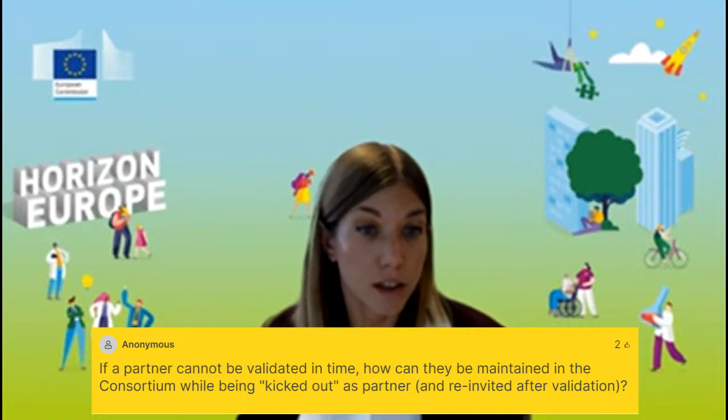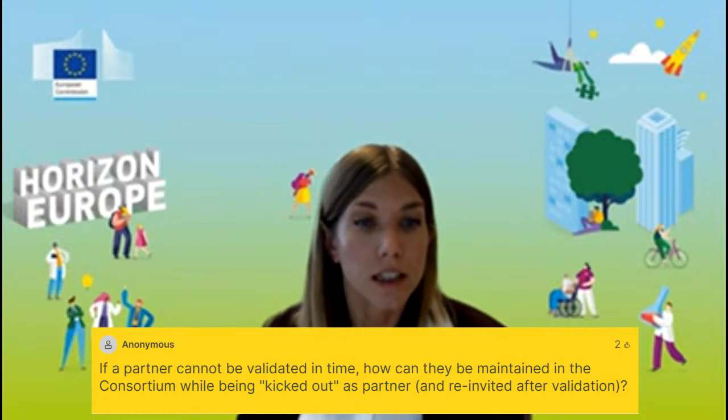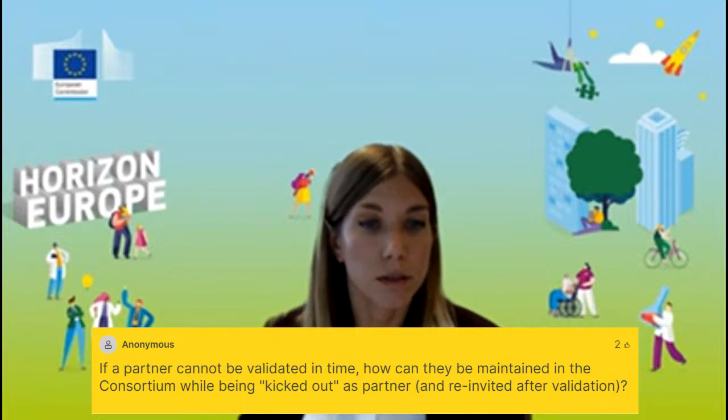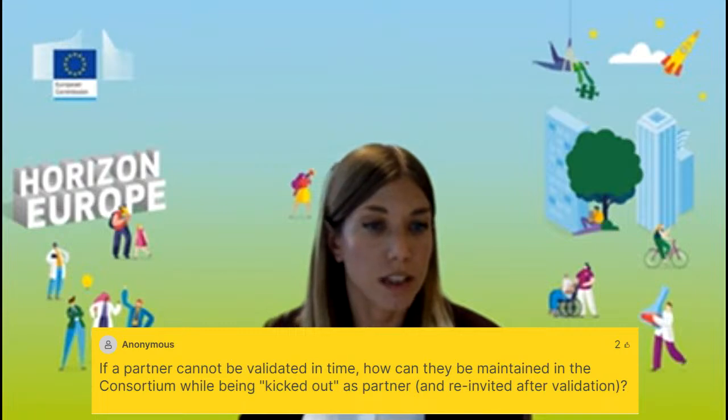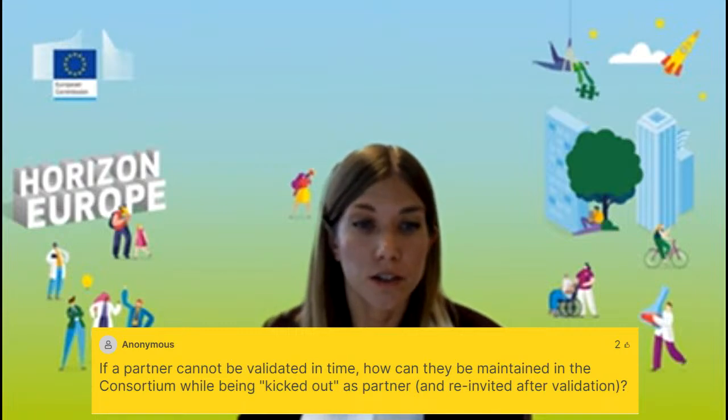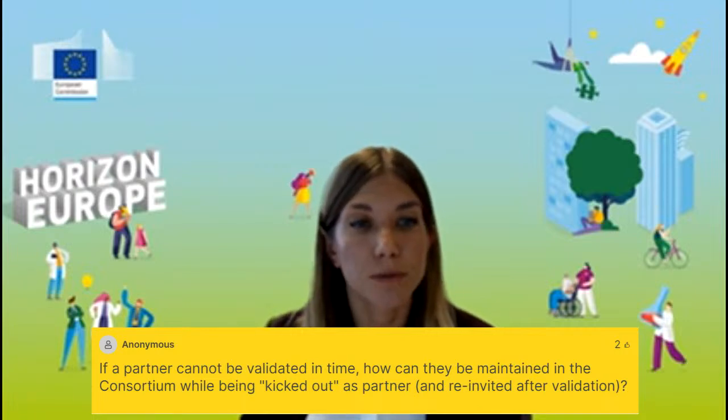If there is no reason to delay the signature of the grant agreement, the participants have the option to accede to the grant agreement later on via an amendment procedure, taking into account that the accession of the beneficiary can never put into question the awarding decision, nor imply substantial changes of Annex 1. In any case, this decision always needs to be taken case by case, and remains a decision of the authorising officer. So for these cases, we would suggest you check with your project officer. Thank you.